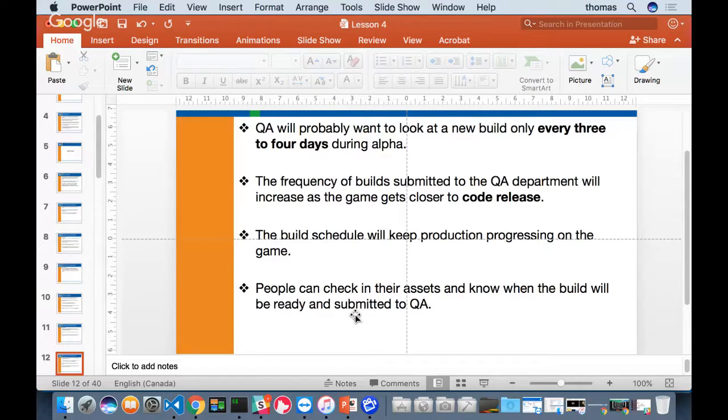Then when you're moving from your first playable to your alpha, do about 3 branches. Then again for your beta, and again for your final release candidate. If you took about four releases with 3 iterations, that's at least 12 iterations of your code. That's a pretty good idea.